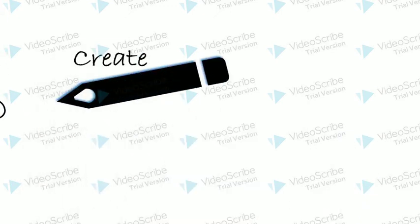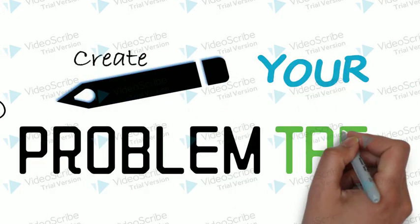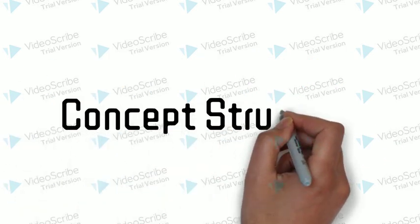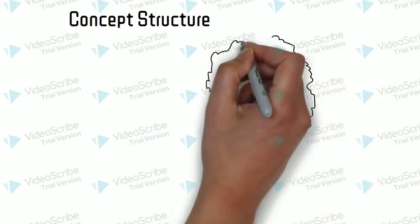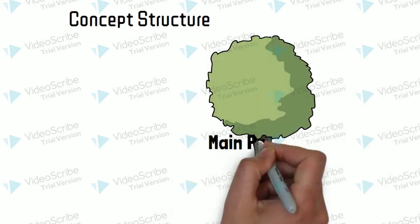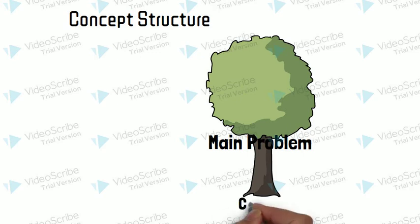So, how to create a problem tree? We shall start with the concept structure. First, we put the main problem on the trunk of the tree, the causes in its roots, and the effects on its branches.